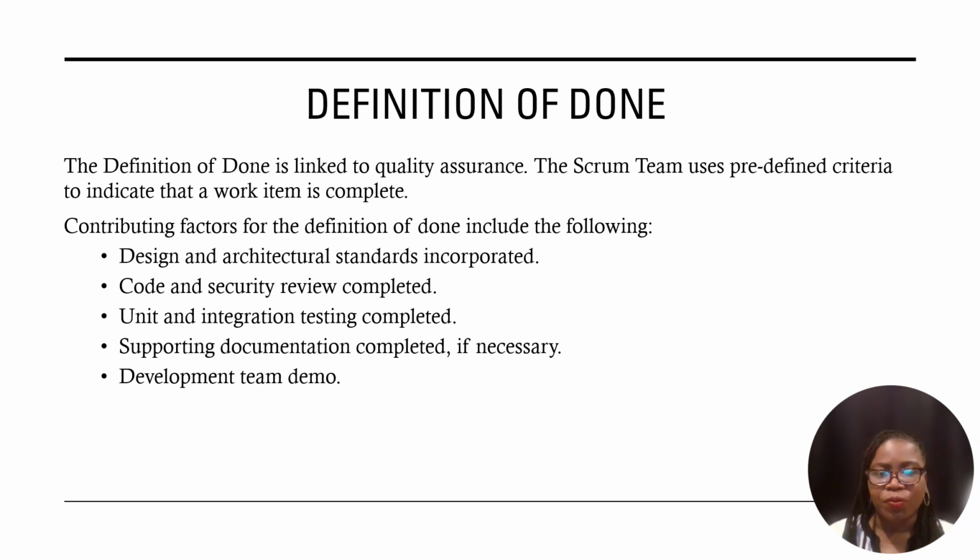Unit and integration testing are other elements that should be defined within the user story if that's a requirement, and it should be a part of the definition of done. So it becomes a checklist of items. Has the supporting documentation been completed? And has the development team done an internal demo if that's your process?